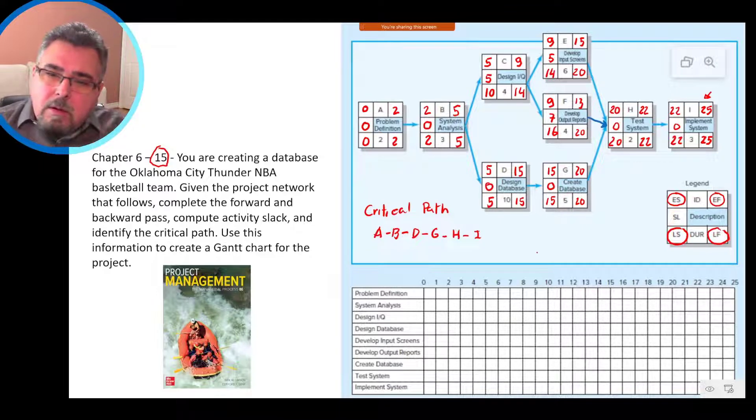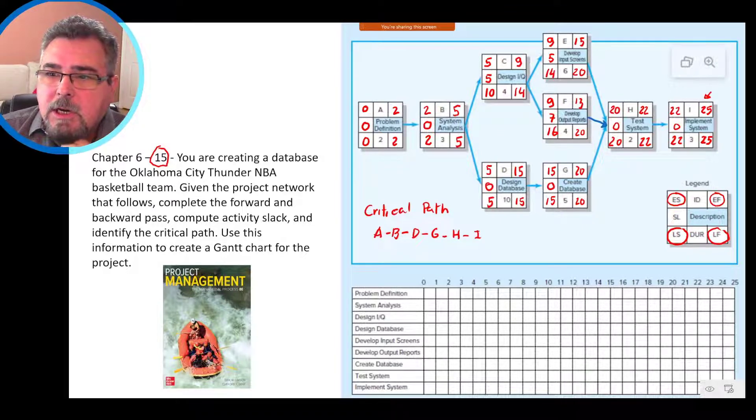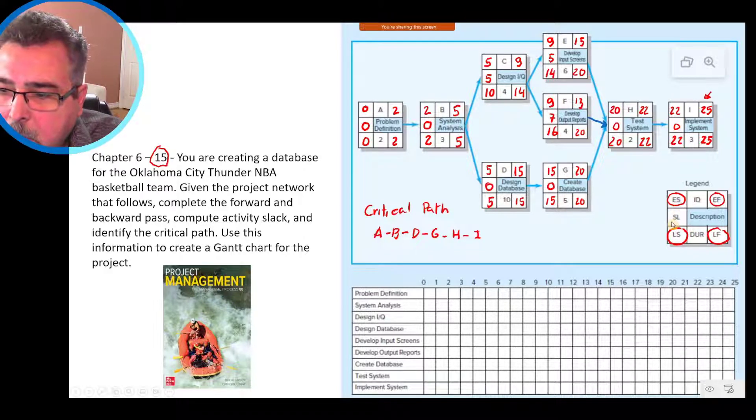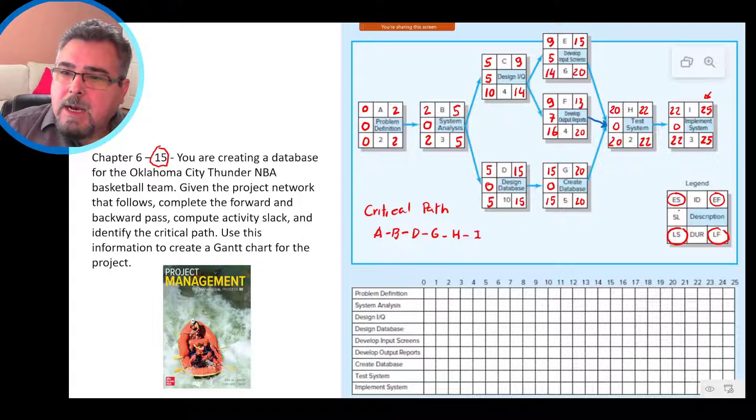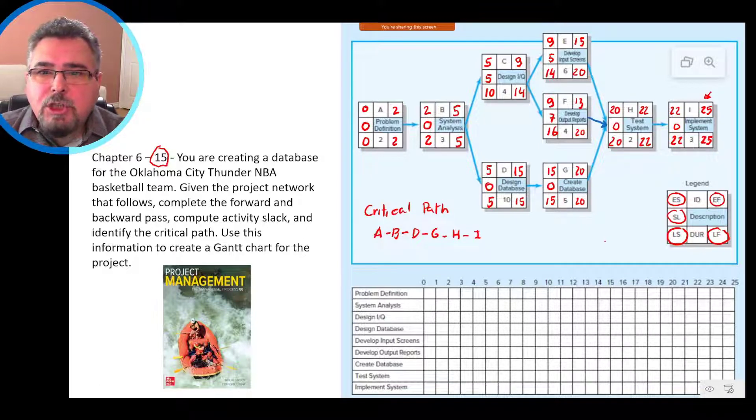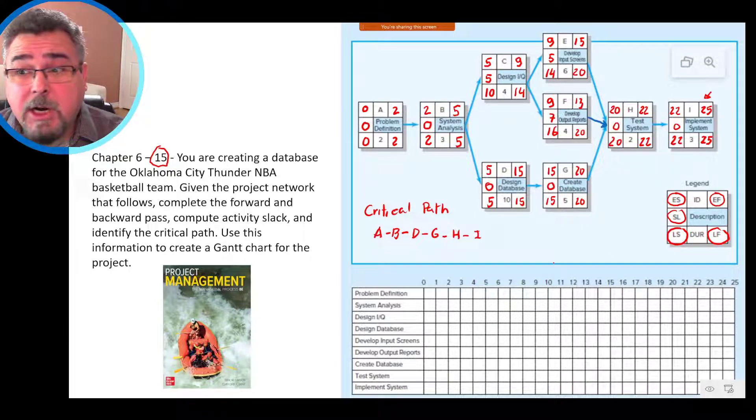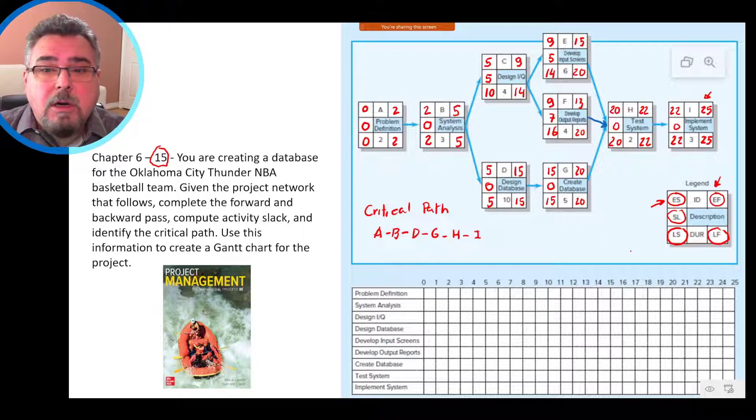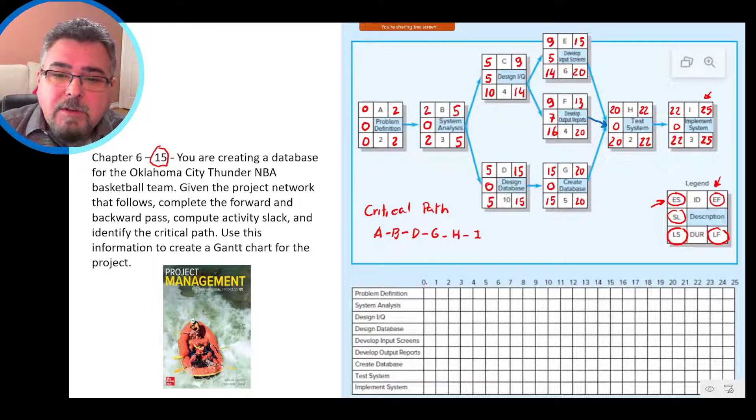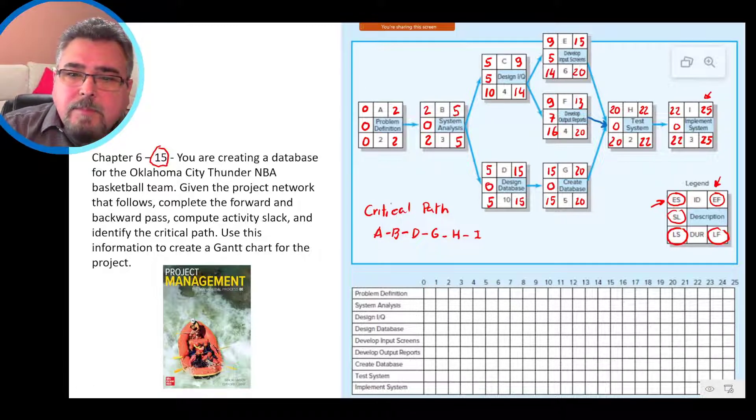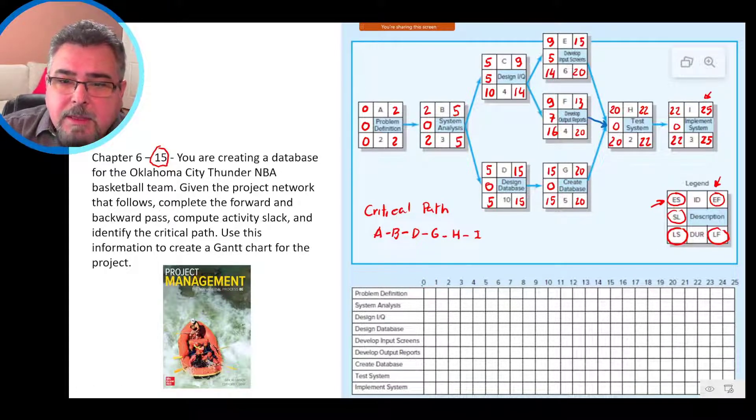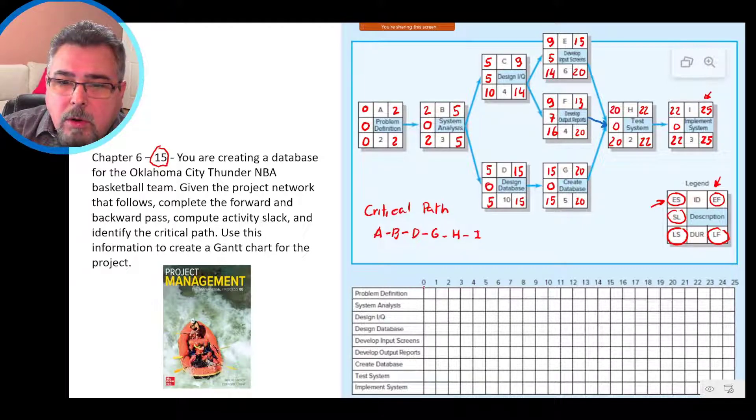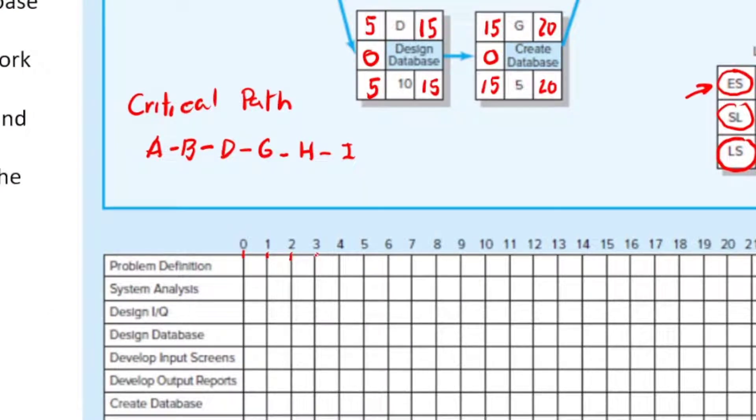Now that we calculate all early start, early finish, late start, late finish, and slack for all activities, we can now draw the Gantt chart. How we draw the Gantt chart? Usually we draw the Gantt chart using the early times, early start and early finish. So we go here, we have 0, 1, those are days. One thing that's important, can you see that the numbers are exactly on the top of the line? That's very important. If you don't put on the top of the line, you can make some mistakes.